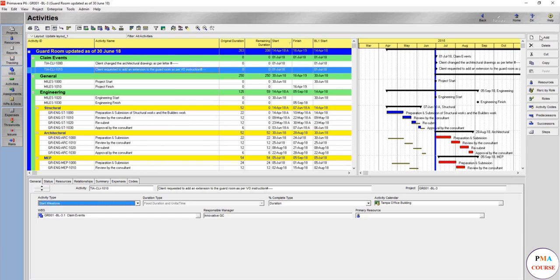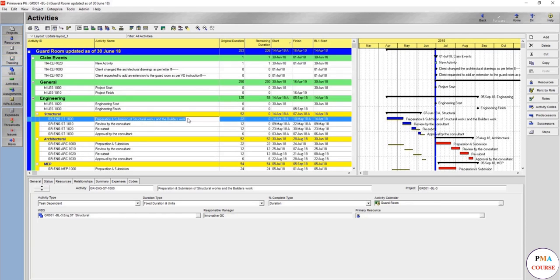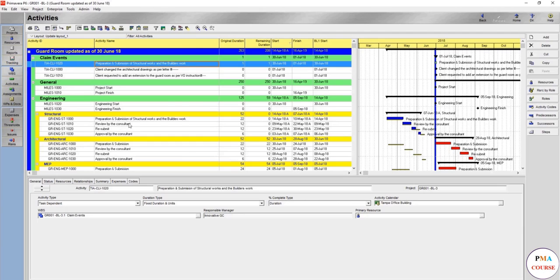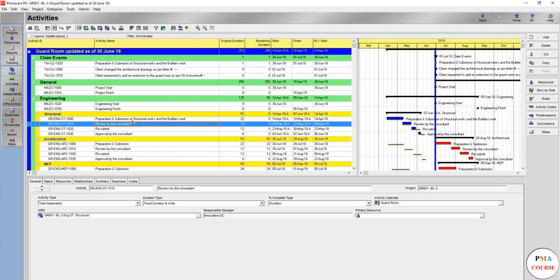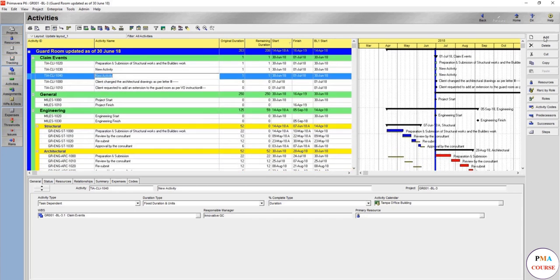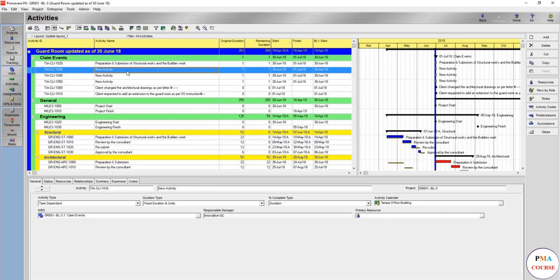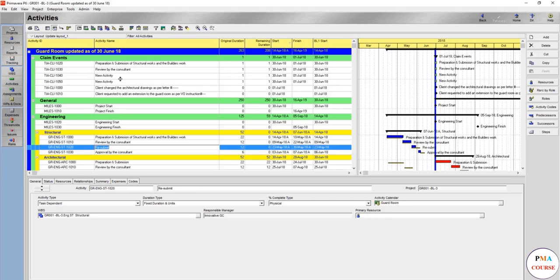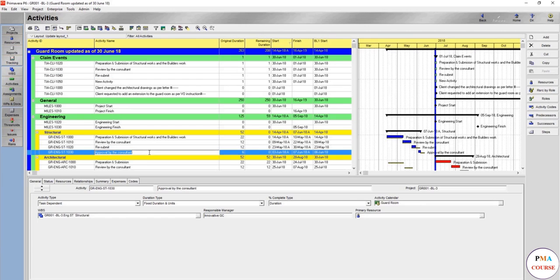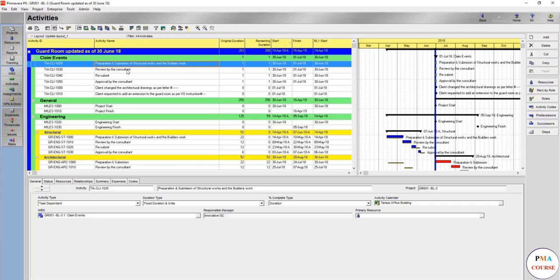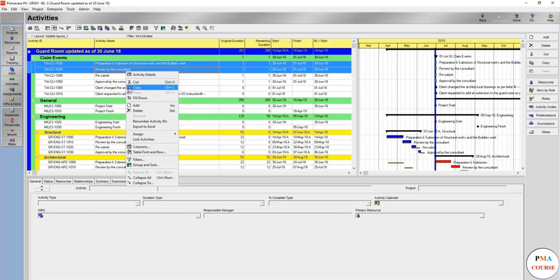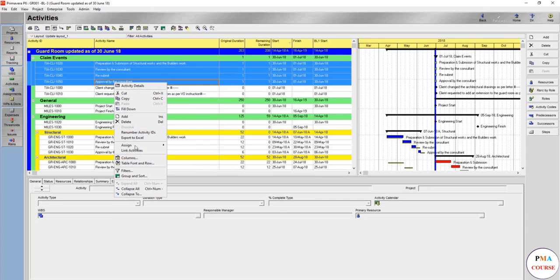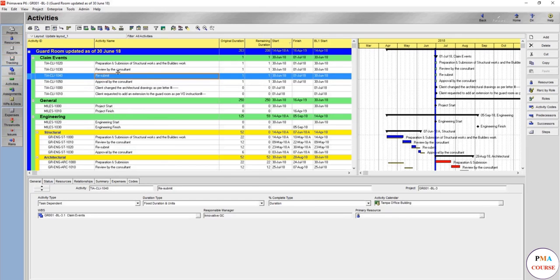So now we are going to add more events, the same as this one exactly. Prepare and submit. We have to do it exactly the same. This is one of the ways, but this is one of the ways to do it fast as well. Add three more. Add three more. Review by the consultant, resubmit, approval by the consultant. This doesn't take any time, just for rough magnitude, rough order magnitude. Link, link activities, and congratulations.